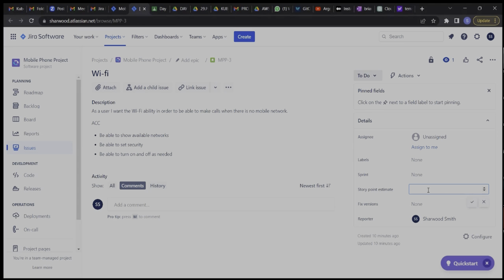It could be that the person with the 5 identifies some other tests the story needs that maybe the person with the 3 missed out on, right? And maybe after explaining that, oh, we have this test to do, so that is why I went with the 5. Then maybe the person with the 3 can say, oh, I forgot, that's true. So we can do the 5. So as a Scrum Master, you facilitate that conversation so that the team can come to an agreement as to what story points to put. Do we understand?